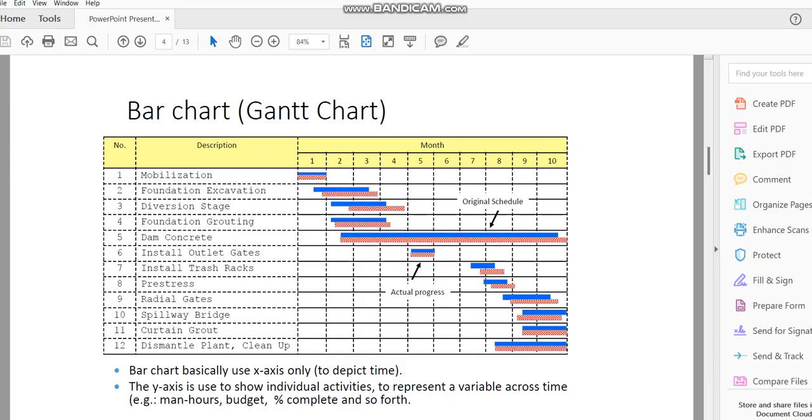So from the sequencing that you're doing, parallel, overlapping, and also sequential activities, then we can actually produce a Gantt chart. And then once you produce a Gantt chart, we run it through CPM, critical path analysis, with the critical path method. You've got your free float and total float. Then you go back and you plan your resources, with your resource leveling and smoothing, okay, or you do your activity crashing, or fast tracking. Then what happens is we will now execute the project according to the resources that we have replanned.